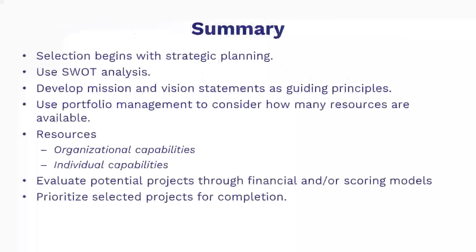In brief, the process of choosing a project is not isolated. It should ideally start with the strategic planning of the company. The first step in this planning is a strategic study of the organization's prospects and threats from the outside, as well as its internal strengths and weaknesses. Next, the organization needs to create its mission and vision statements, among other guiding concepts. The majority of businesses will hold an annual planning meeting when strategic goals and the ensuing action plans are created. Potential initiatives will be identified as a result of these action plans.